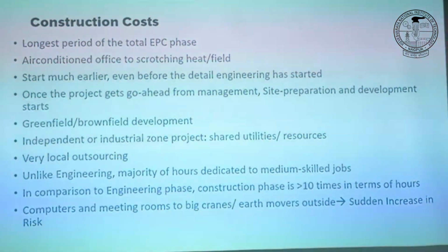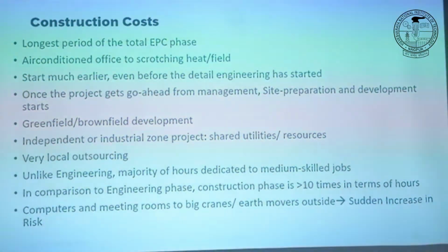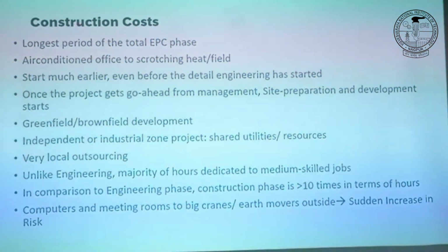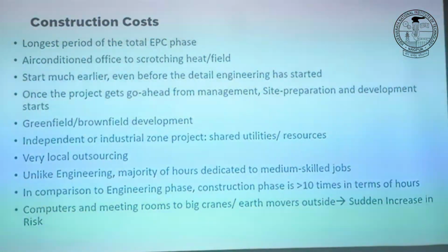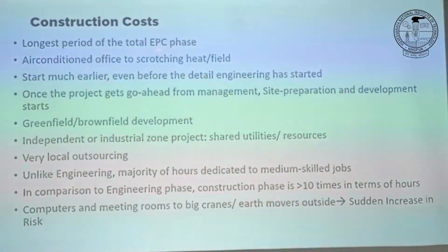Then the major cost normally what you think is cost of equipment, but in chemical plant the major cost is associated with construction. It was also surprising for me in early years. I thought, what is standing there. More often than not, you buy something for 100 and to get it installed, before you see you already spend 300. So construction cost is also the longest phase of your total project life cycle before